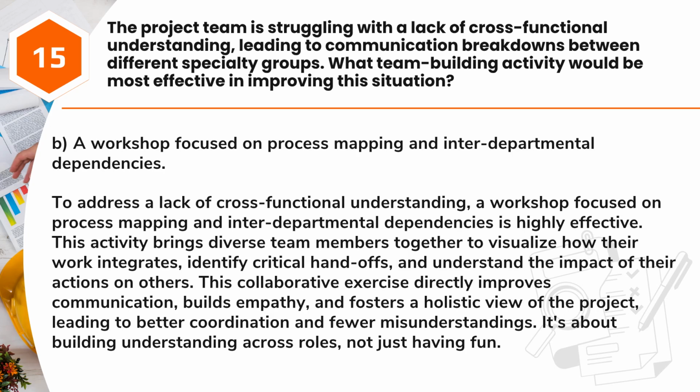Answer: B. A workshop focused on process mapping and interdepartmental dependencies. To address a lack of cross-functional understanding, a workshop focused on process mapping and interdepartmental dependencies is highly effective. This activity brings diverse team members together to visualize how their work integrates, identify critical handoffs, and understand the impact of their actions on others.